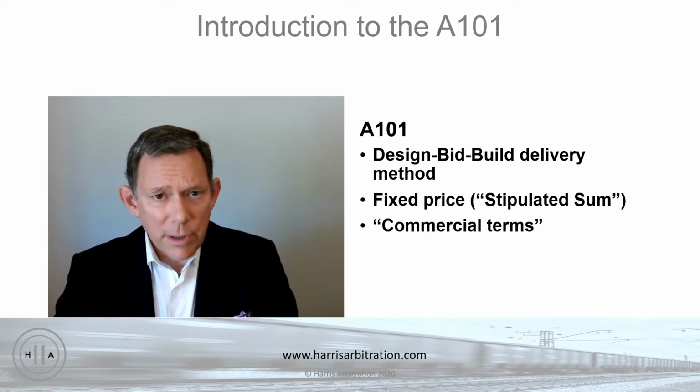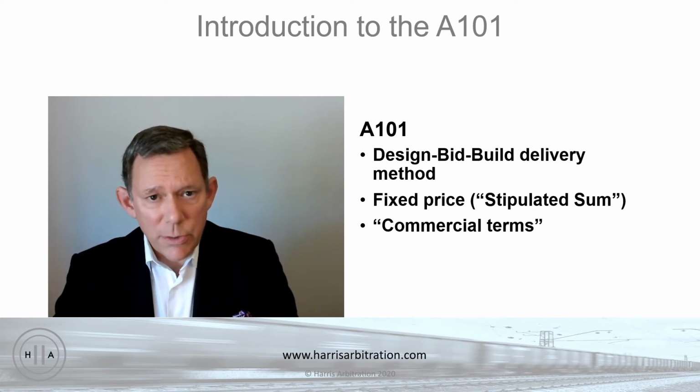The legal terms are in a separate document, the A201, and we'll focus on those in a subsequent presentation. But the basic concept is that the A201 has a lot of terms and conditions that will apply across multiple pricing mechanisms and aren't necessarily going to change a huge amount from deal to deal. So while the A201 certainly gets negotiated, and sometimes very heavily, it doesn't have the commercial terms in the sense of price, schedule, etc.